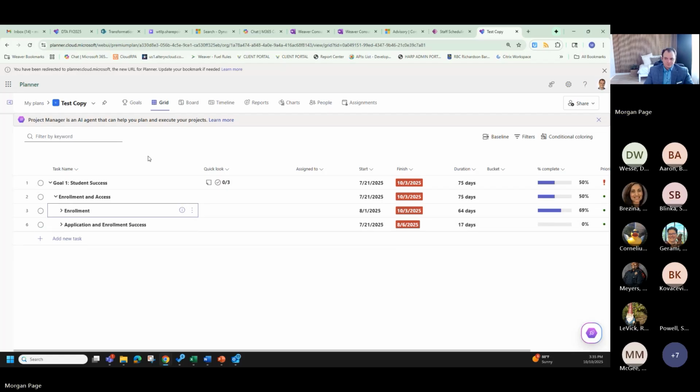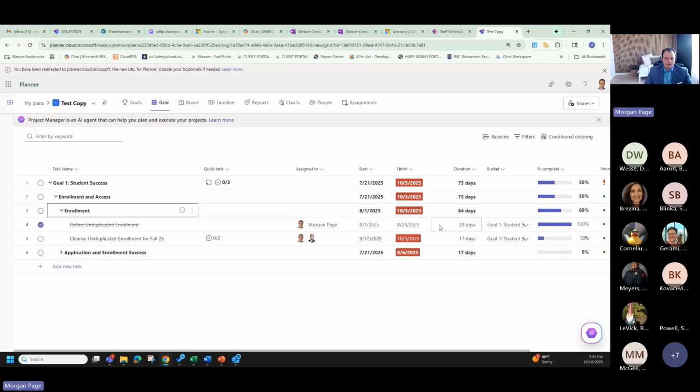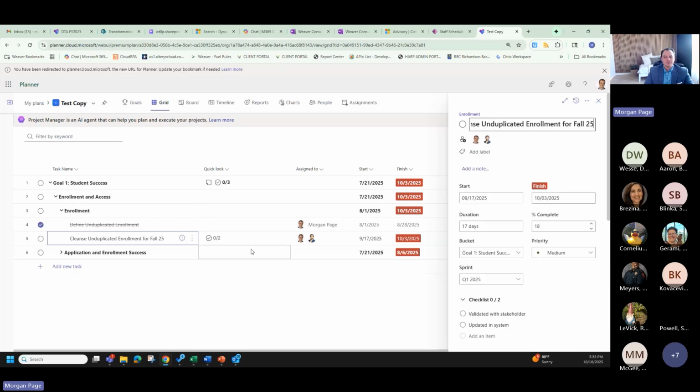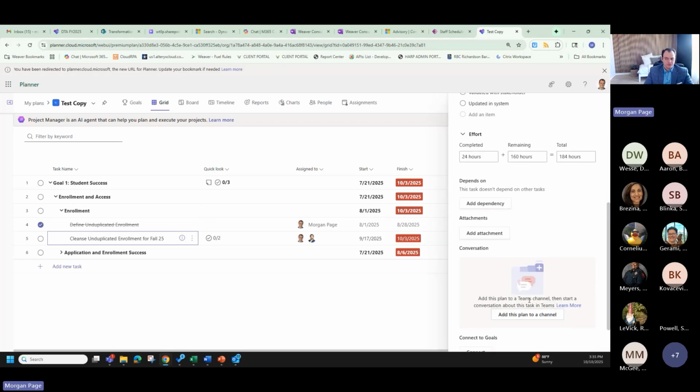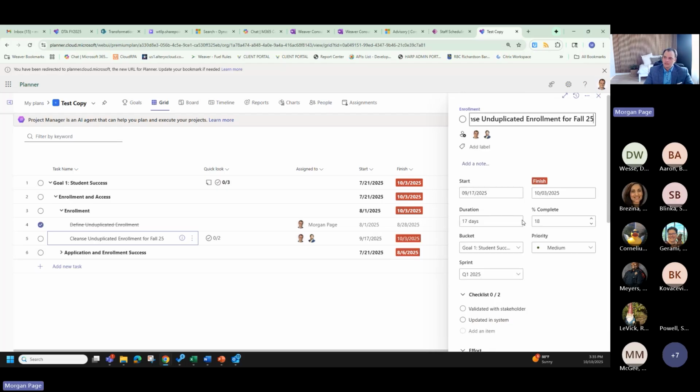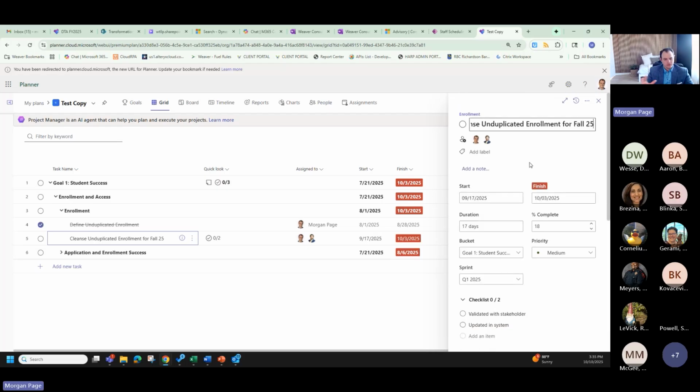So, as you can see here, in every goal they all have the same data fields, every goal, every level, every task, and it just gets populated based on what's below. On each of the tasks, you've got a pretty rich field on what you can fill out. And so whenever you've broken out your departmental goals and you're doing the actual tasks, I'll start at the bottom and then come up. The minimum you need is the title, the start, and the end date.